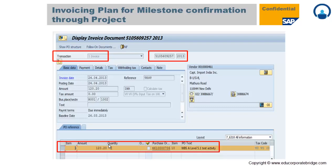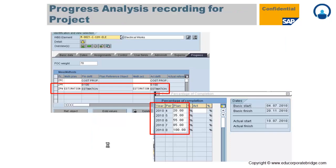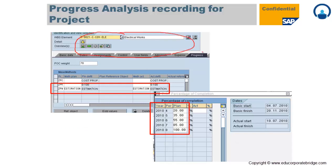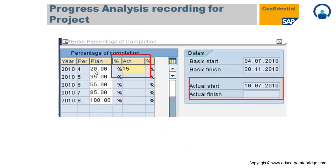Progress analysis gives you an indication of whether your project progress is underrun or overrun against schedule or cost. SAP provides different methods: work-based method, weight-based method, and cost-based method. You provide the planned percentage of completion, and later provide the actual work percentage of completion along with actual start and finish dates. All of this is maintained on the WBS and activity under the Progress tab.